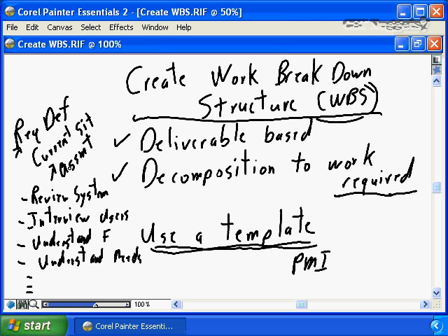With the work breakdown structure completed, you will present that to senior management, you will present that to your project sponsor, and you will say, based on this work breakdown structure, if I complete all of the work defined in this breakdown structure, will this, A, satisfy the statement of requirements, the scope statement that has been produced, and more importantly, if this work is produced, is this your expectation of the work that I need to undertake as part of the project to achieve the business objectives for which this project was initiated? In other words, if my project successfully delivers the work defined in this work breakdown structure, will it address your business requirements?